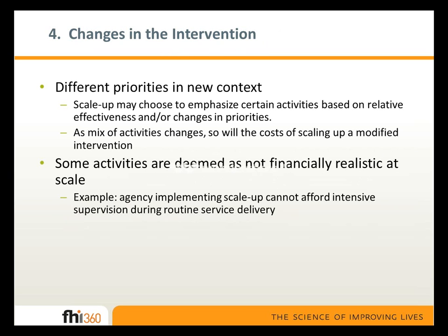Finally, there can be changes in the intervention between the pilot and the scale-up. So it might be that the scale-up chooses to emphasize certain activities based on relative effectiveness and/or changes in priorities that were discovered in the pilot. And so as the mix of activities changes, so will the costs of scaling up this modified intervention.